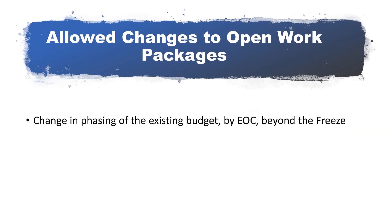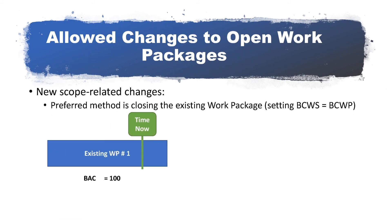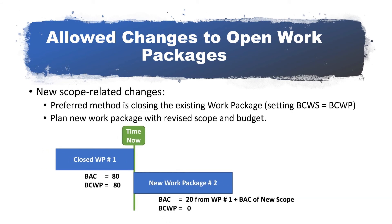Finally, a few words on the changes that are allowed to open work packages. If there is no scope adjustment or impact within the freeze period, the time phasing of the BCWS for an open work package may be changed within the overall budget and schedule parameters. This must be done by element of cost, or EOC. When new scope has been authorized which changes the current scope of an open work package, the preferred method is to close the work package by setting BCWS equal to BCWP. This method will erase any schedule variance but retain the cost variance in the closed work package. A new work package is then established comprised of the remaining scope and budget from the closed work package, plus the scope and budget of the newly authorized scope. The budget value used from the closed work package is calculated by subtracting the cumulative BCWP from the Budget at Completion, or BAC.